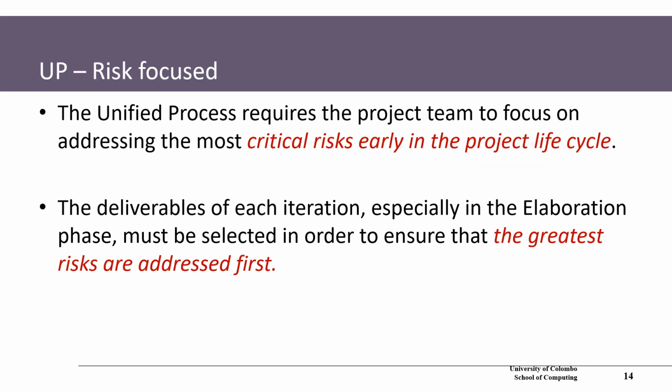Risk focused. Well, we don't care about it until it becomes a threat. So we have to live with the risk. Even these days, there are so many risks, but until it affects me or you, it is not critical. The Unified Process requires the project team to focus on addressing the most critical risks early in the project life cycle.